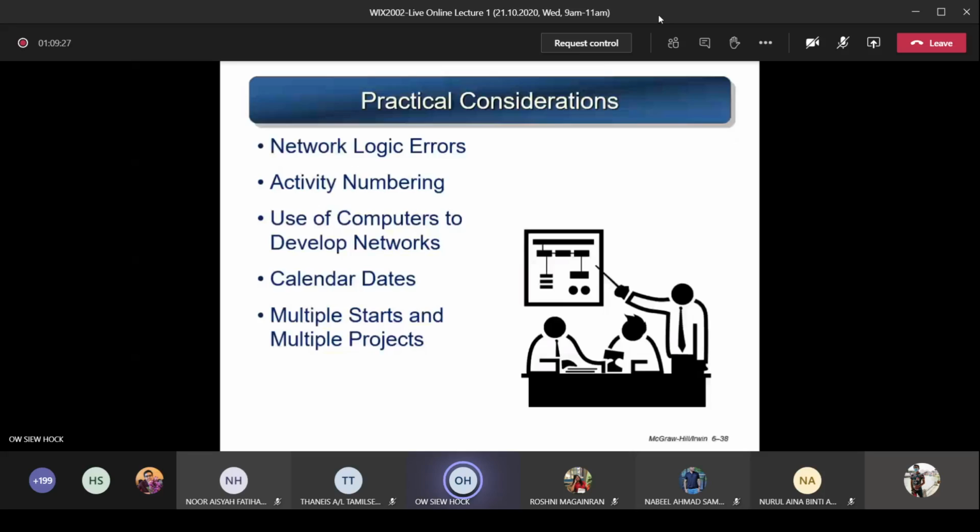So it's not necessary you use A, B, C, D, E. So you can have A then followed by G. So in case when you're drawing a network diagram, you miss some activities in between. So it's better you have A, let's say G, and then let's say M. So in between, if you later want to add another node, then you can just insert without having to change the latest node, because from A to G, in between you have some numbers, B, C, D, F, and so on, you can add.